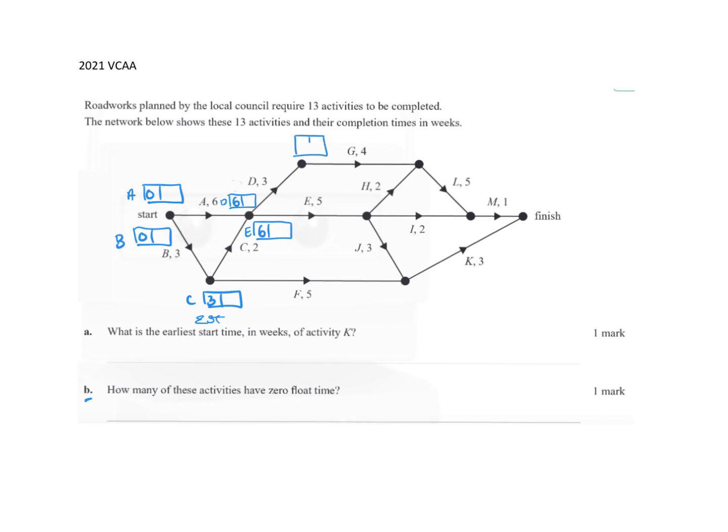Okay, so following along up here, the 6 plus the 3 makes the 9. And here I've got L. Now, if I was going along the G way, I would have 9 plus 4, which is 13. I'm just going to leave that there because I can see there's another entryway into it. So if I have H here, H would be the 6 plus the 5, which is 11, and 11 plus 2 is also 13. Okay, so I'm happy to leave the 13 there.